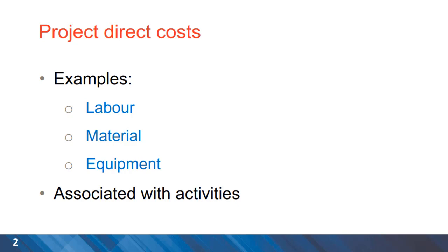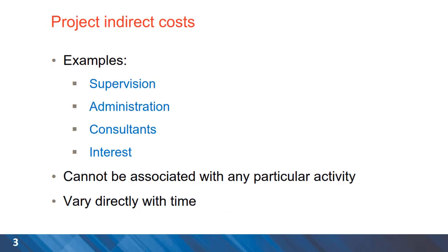Before starting the main discussions, it is important to understand project direct costs that are related to labour, material and equipment required for completing different project activities. Also project indirect costs which include costs such as rent paid for offices, cost of supervision and some managerial costs. These are not directly related with project activities.